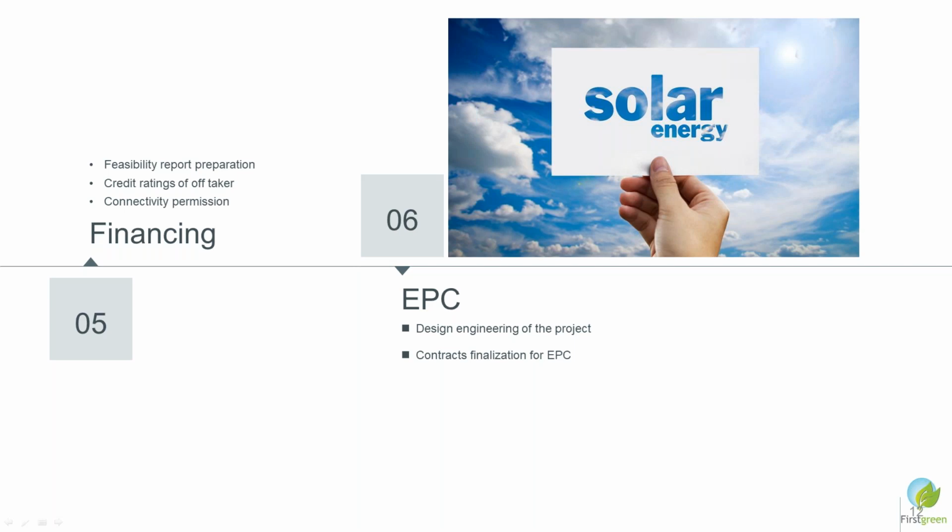You have got two options. You can get the debt financing, or you can bring the investor as an equity partner in the project, and they will have their due diligence, which are like technical due diligence, the regulatory due diligence, and the PPA will also be subjected to the legal due diligences.